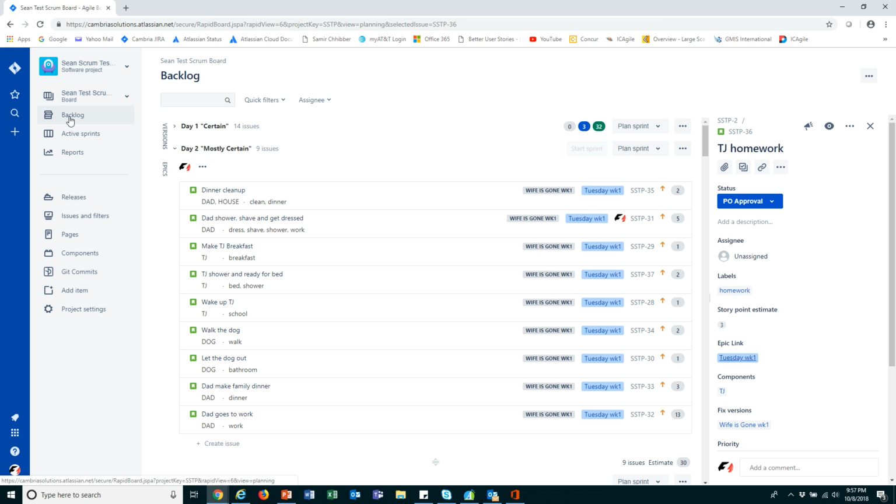All right, working from the top down, the team looks at it and says, well, this is the highest value story based on the priorities that the team and the product owner have negotiated. And the team looks and they see the 2-point story and they go, yeah, that is something that we do believe that we can commit to. So it's agreed upon, and now the story is going to be added to the active sprint.